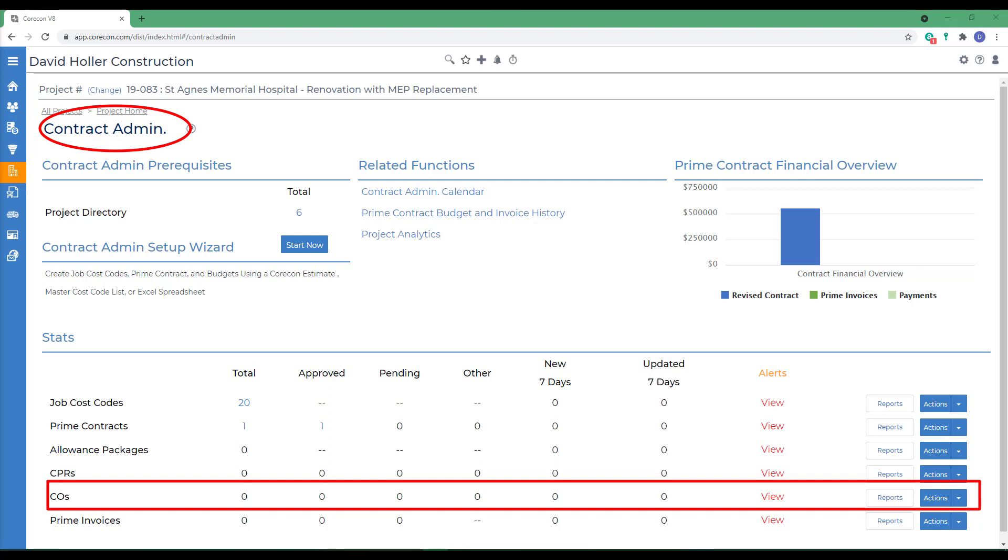A Change Order only impacts the finances of a project and prime contract once the Change Order status has been marked approved and a status date has been assigned. To be included on a prime invoice, a Change Order must be marked approved. A Change Order status date must be less than or equal to the prime contract invoice's issue date.